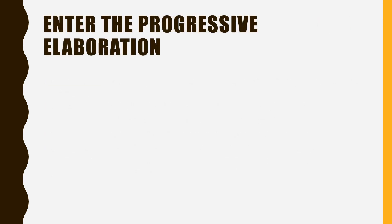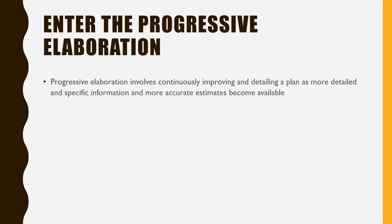On that question comes in a concept known as progressive elaboration. The bookish definition: progressive elaboration involves continuously improving and detailing a plan as more detailed and specific information and more accurate estimates become available. As a project manager, you should plan every single detail possible — but the concept of progressive elaboration tells you that you should improve and detail your plan as and when you get more detailed, specific, and accurate information.